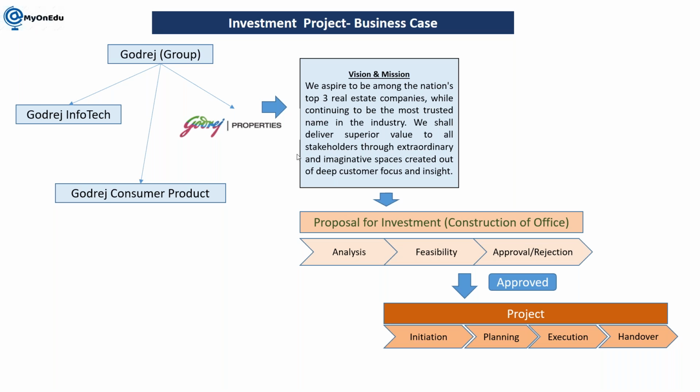So this is a typical example of an investment project, and once this project is ready, it will become an asset. So this total cost, whatever is incurred to execute this project, has to be posted into the asset. The same scenario we will follow in our upcoming sessions to understand.